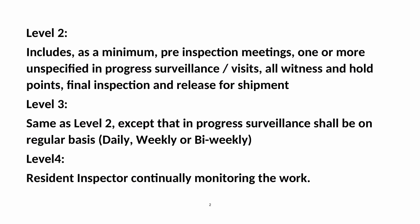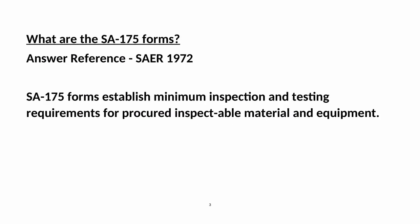Level 3 is the same as Level 2, except that in-progress surveillance shall be on a regular basis — daily, weekly, or bi-weekly. Level 4 requires a Resident Inspector continually monitoring the work.